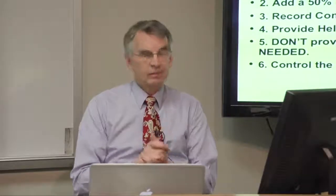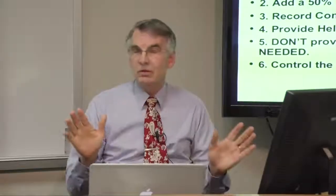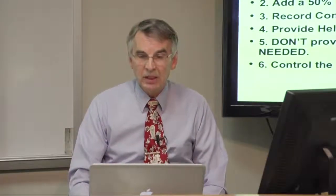How are we going to do this then? Simple. You just follow those steps. You make a plan. You put 50% buffer at the end. You record the completed tasks. And if needed, you give help. Somebody's in trouble, you give help. If they don't need help, then don't give them help. Just help them when they need it.